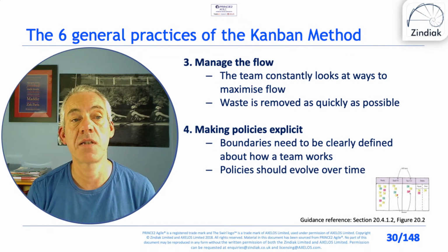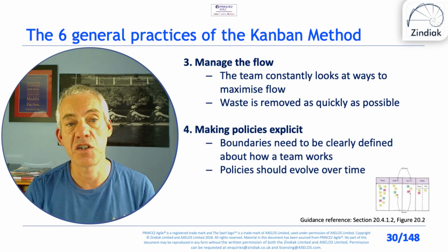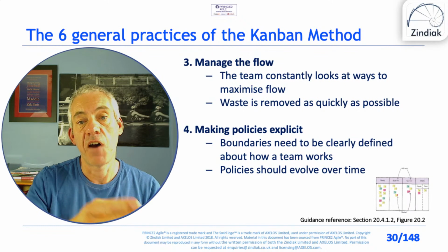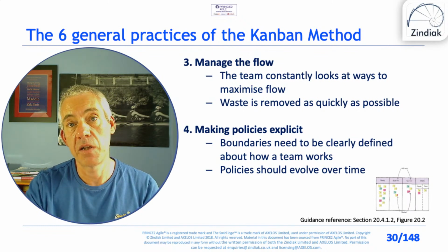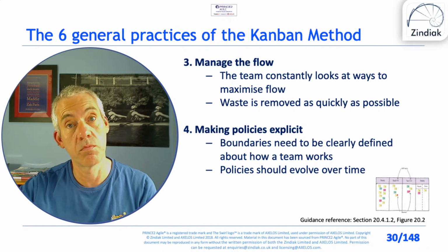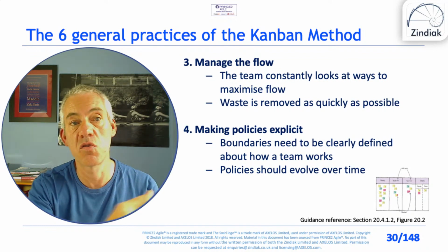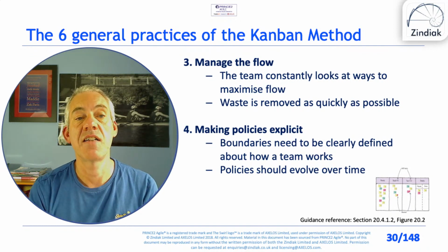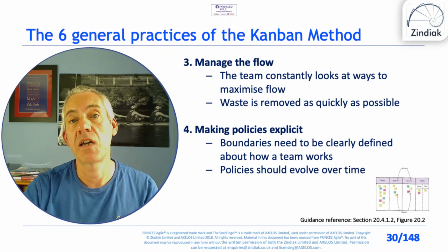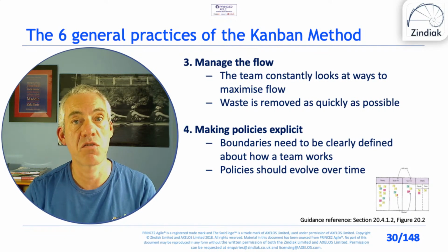Making policies explicit. So having a definition of ready, having a definition of done, defining what we can take into build and how much we can take into build, when we can put it into test, when it is tested, what constitutes tested, who can do that. So it's those sorts of policies, and as it says, they evolve over time. So they're very much working agreements, policies that we can review in the sprint retrospective.